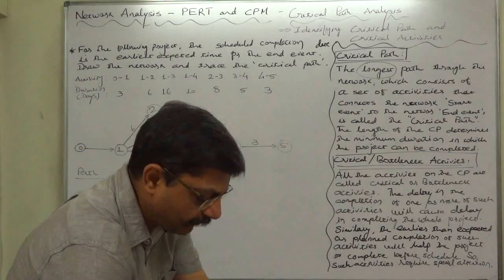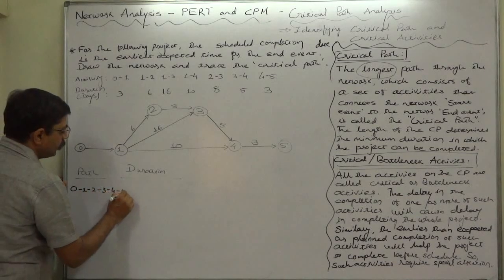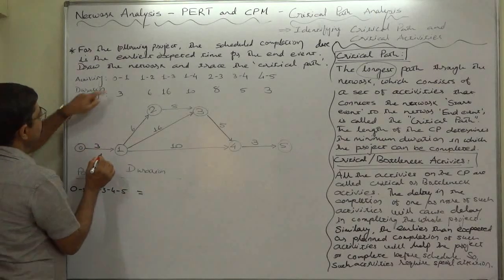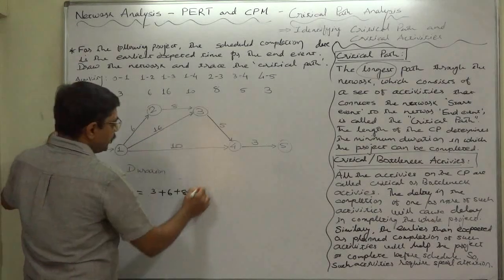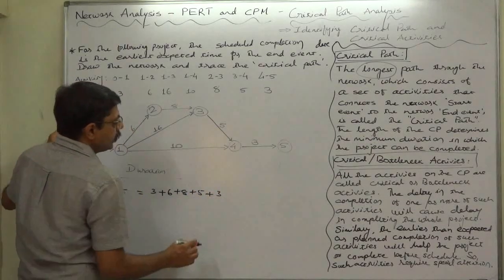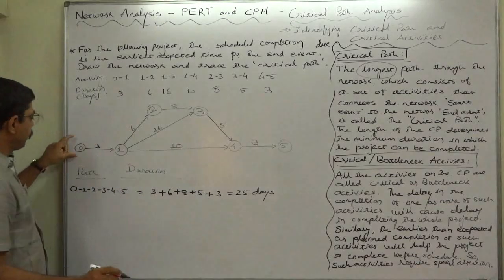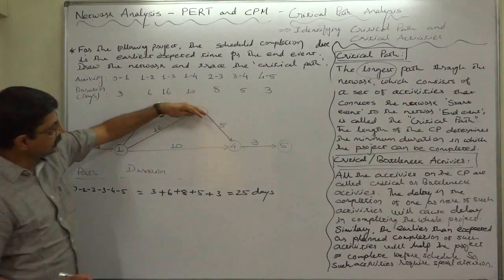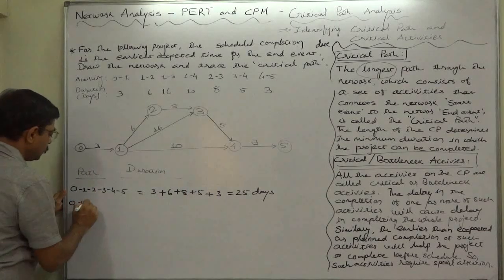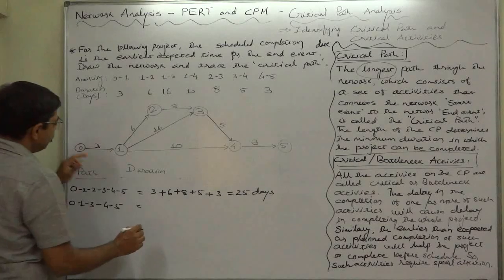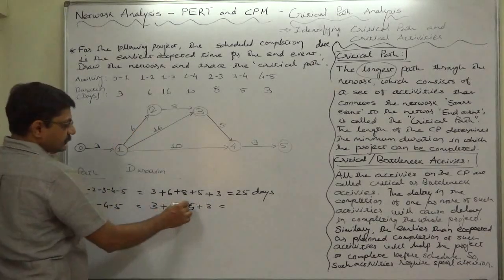For the first path, 0 → 1 → 2 → 3 → 4 → 5: the duration is 3 days for 0–1, plus 6 days for 1–2, plus 8 days for 2–3, plus 5 days for 3–4, plus 3 days for 4–5, giving 3 + 6 + 8 + 5 + 3 = 25 days. Another possible path is 0 → 1 → 3 → 4 → 5, which takes 3 + 16 + 5 + 3 = 27 days.